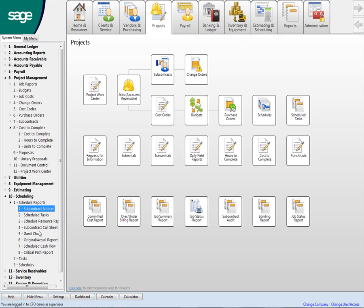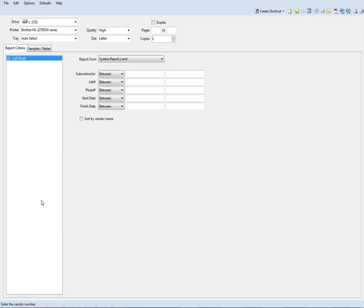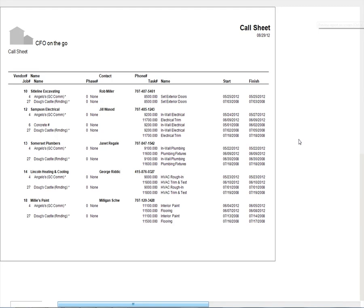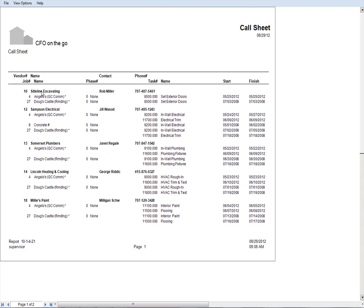The other way to do it is there's a little other thing called the subcontract call sheet. I'm just going to run this for all the jobs. So in this case, same information, different format. So this is a sub, sightline excavating. Here's my Samson Electrical again. So a lot of times what people will do is they'll have this and they'll give this to somebody in the office, administrative assistant, receptionist, project engineer, somebody, and say, okay, I want you to make some phone calls. I want you to call all these subs, ask for this person, dial this phone number.